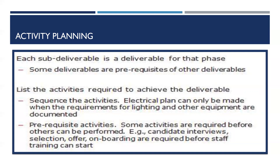Defining the activities involves identifying the deliverable at the lower level of the WBS — level three — which is called the work package. You then decompose work packages into smaller components called activities, to provide a basis for estimating, scheduling, executing, monitoring, and controlling the project work. Document all planned work.